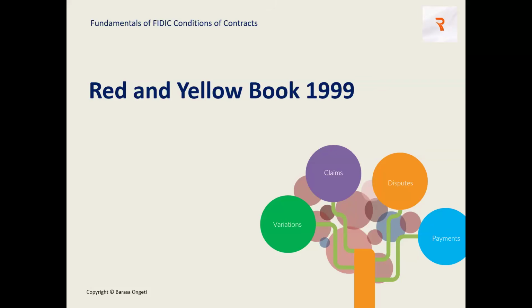One, you talked of the red book, whereby most of the time they are ad-measured contracts, and the contractor is paid based on the value of work. And when you get to the Ugandan system, based on the little glance that I've had on our contracts, the contractor is issued a contract, and in that contract, we see there's a planned contractual figure, let's say 7 billion. Upon implementation, remember here that as the client, the employer, we have given the contractor the designs.